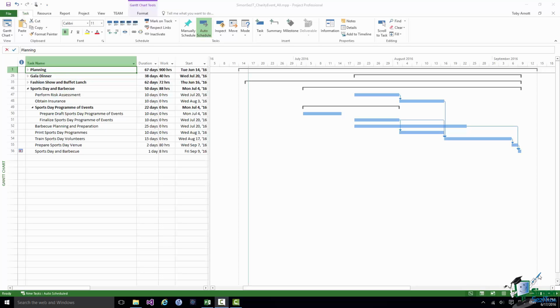I'm going to show you 1 or 2 options for splitting as we go through the next few sections, and as you'll see there's very often quite a bit of work to do. Usually a very good proportion of that work relates to the relationships between the tasks in the initial program before we split it up, and maintaining those links when we split the program of work up.